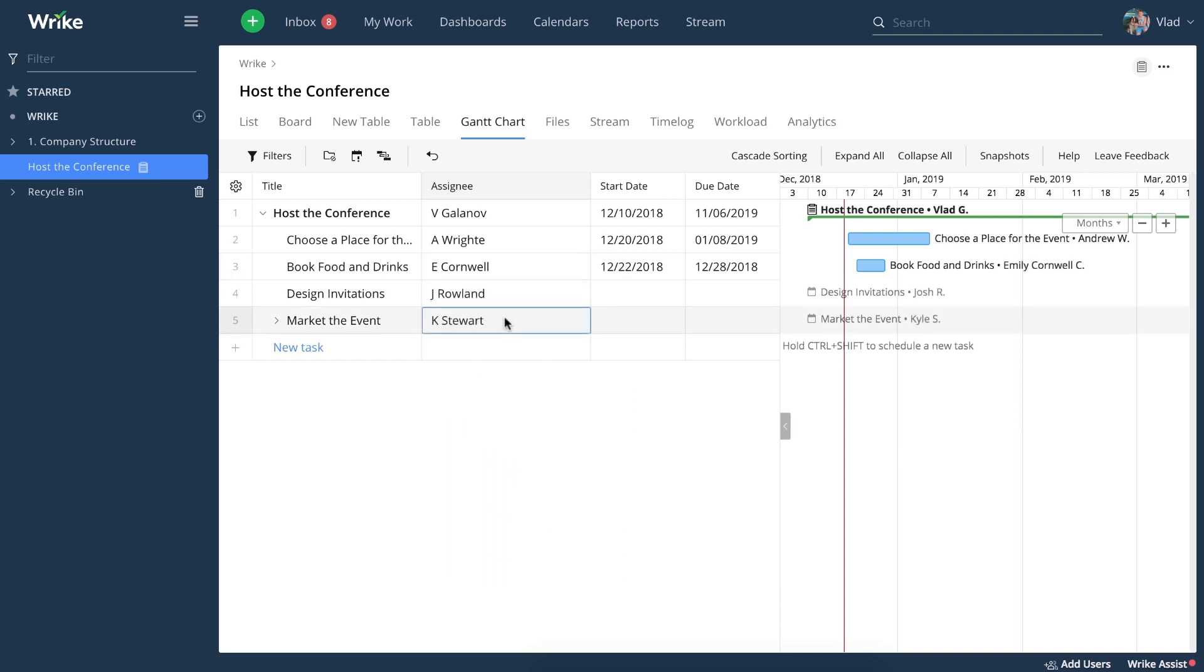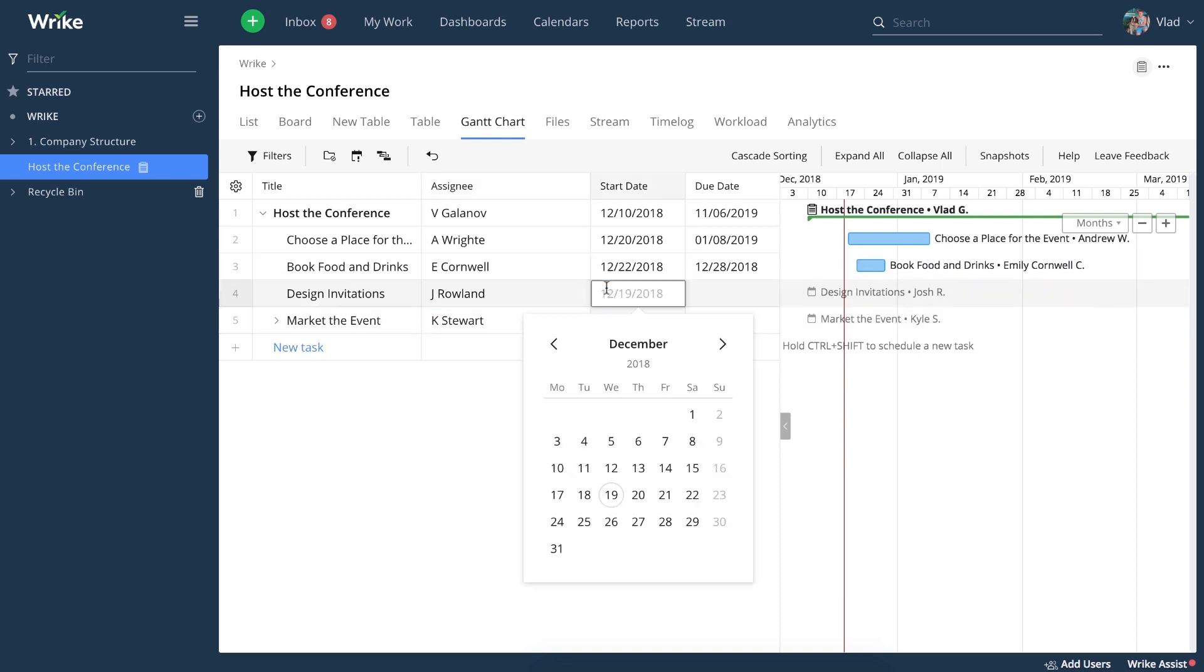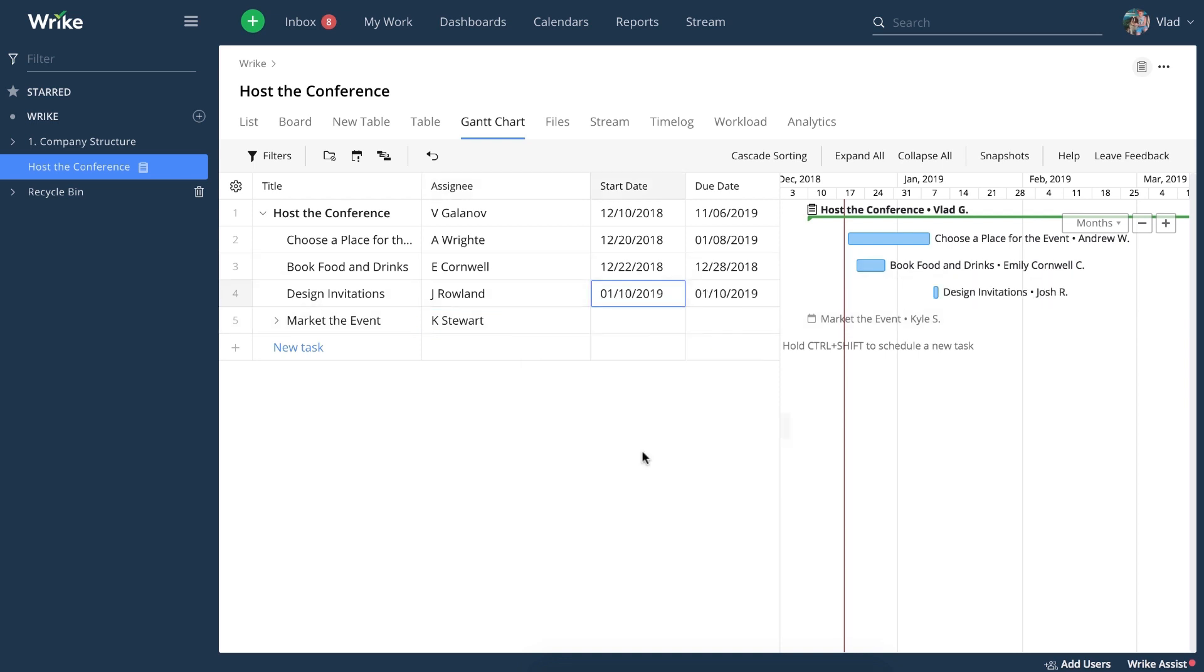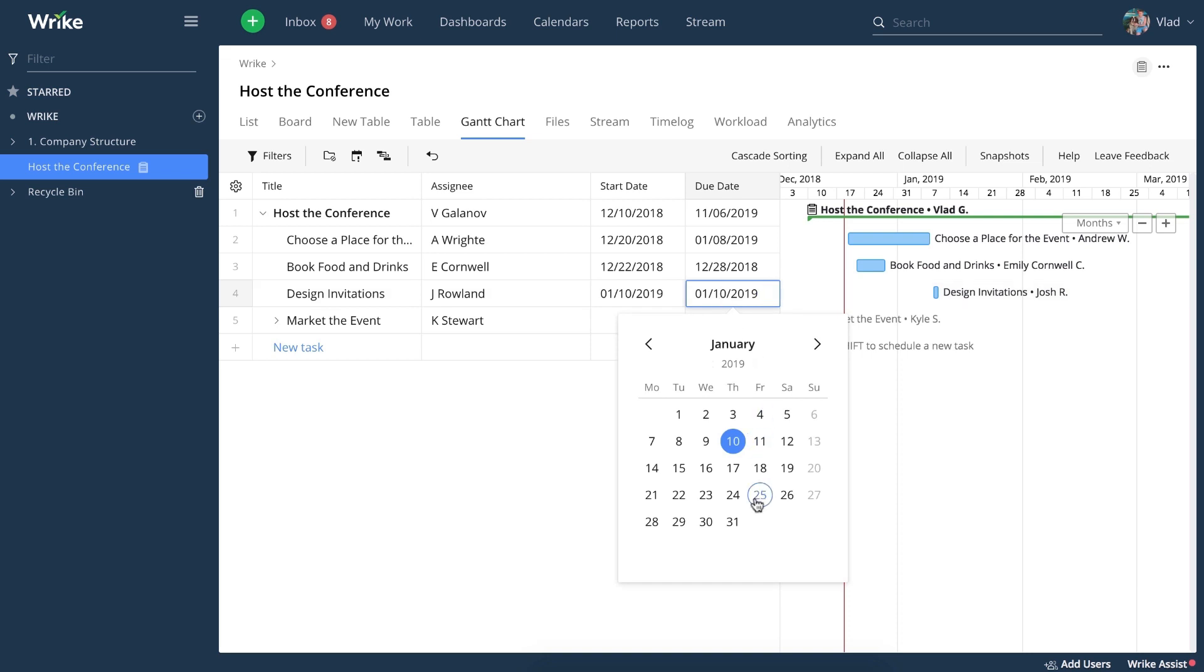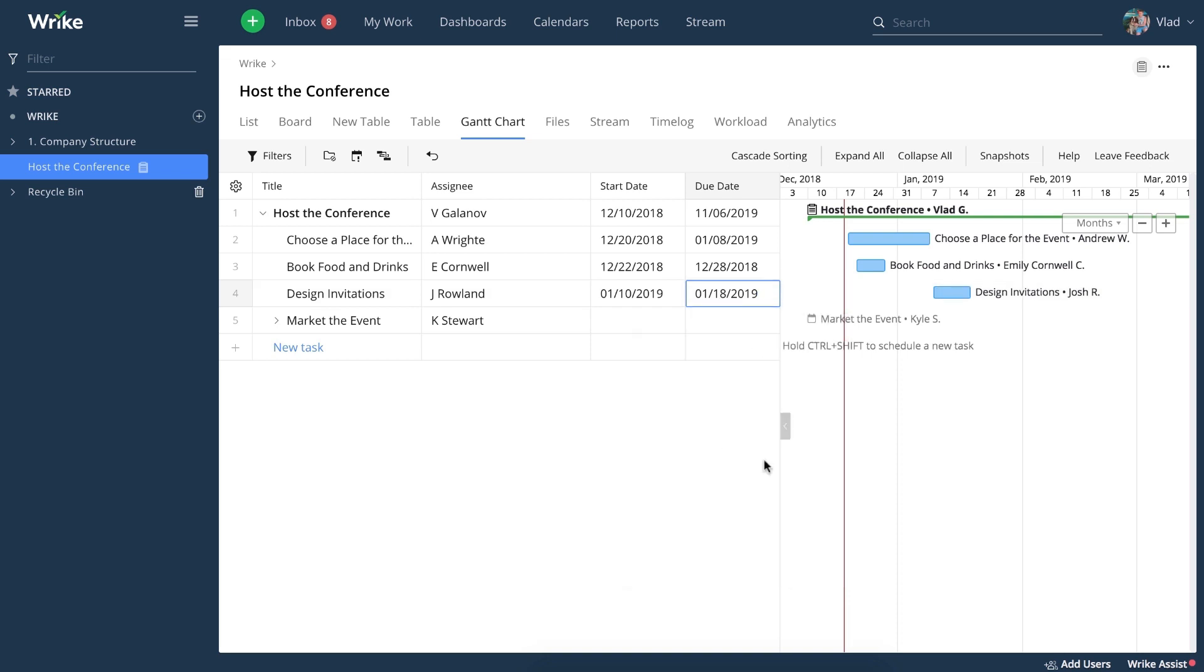Now that all your tasks are assigned, you can schedule them too. You can see that right when you schedule the tasks, they appear in your timeline view. You can define both start and due dates from the table part of the Gantt chart view.